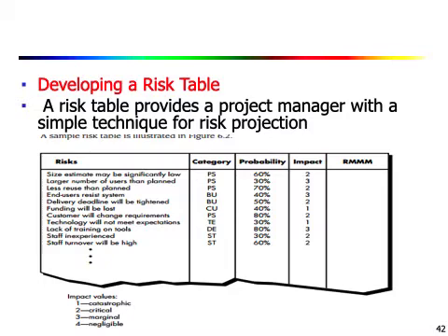An impact category is determined, and the category of each of the four risk components, that is performance, support, cost and schedule, are averaged to determine the overall impact value for the risk.